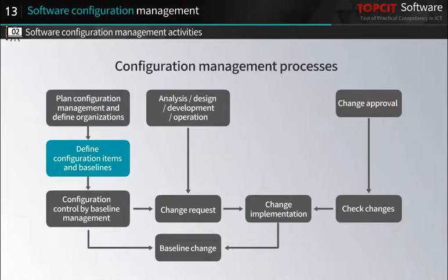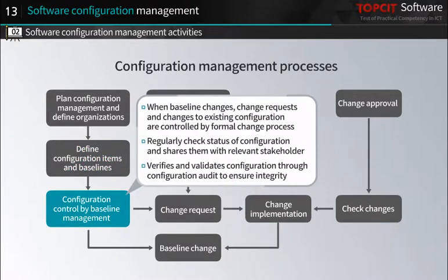Next, it defines the configuration items and baseline. Then it controls the configuration through baseline management. When the baseline changes, change requests and changes to existing configuration are controlled by the formal change process, and the status of these configurations is regularly checked and shared with relevant stakeholders. It also verifies and validates the configuration through configuration audit to ensure integrity.